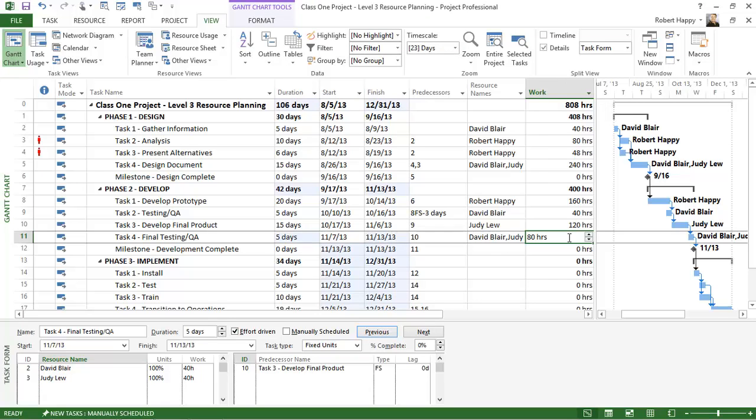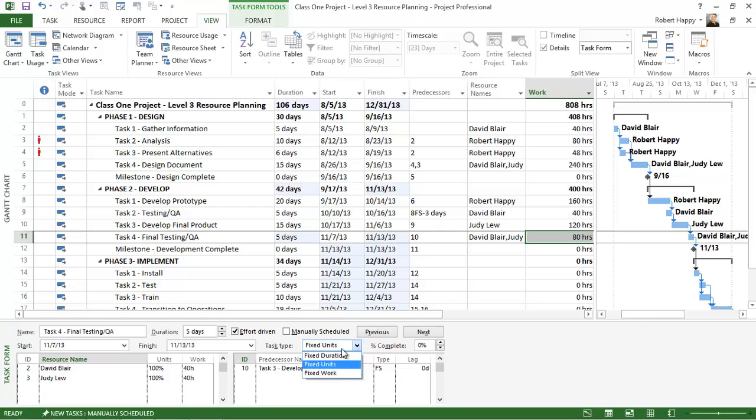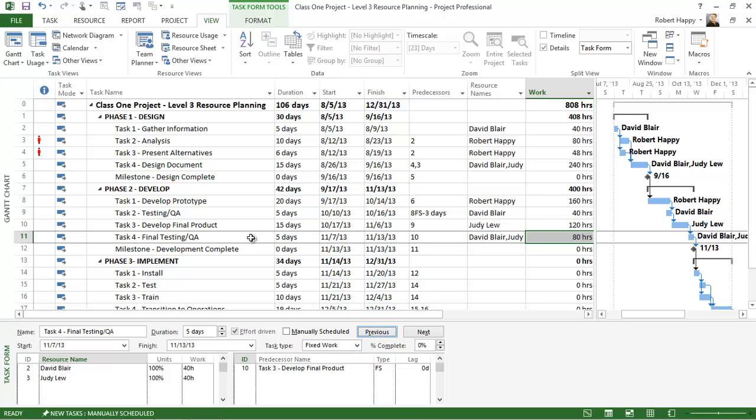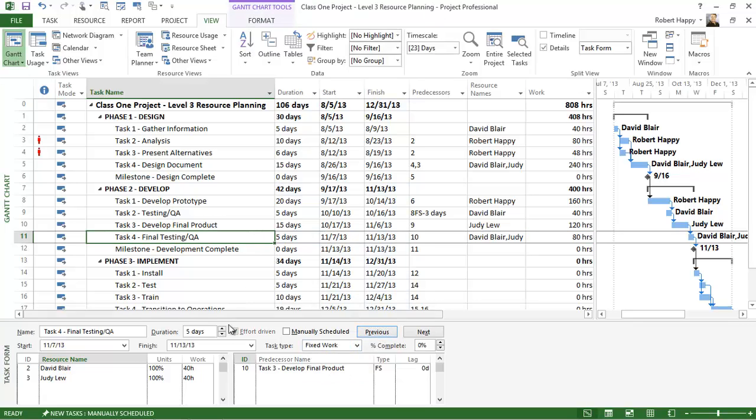So you can accomplish effort-based scheduling either with fixed units and effort-driven turned on, or remember if you choose fixed work and click OK, it automatically clicks off effort-driven. So that's how you can take an effort-based approach to scheduling in Microsoft Project.